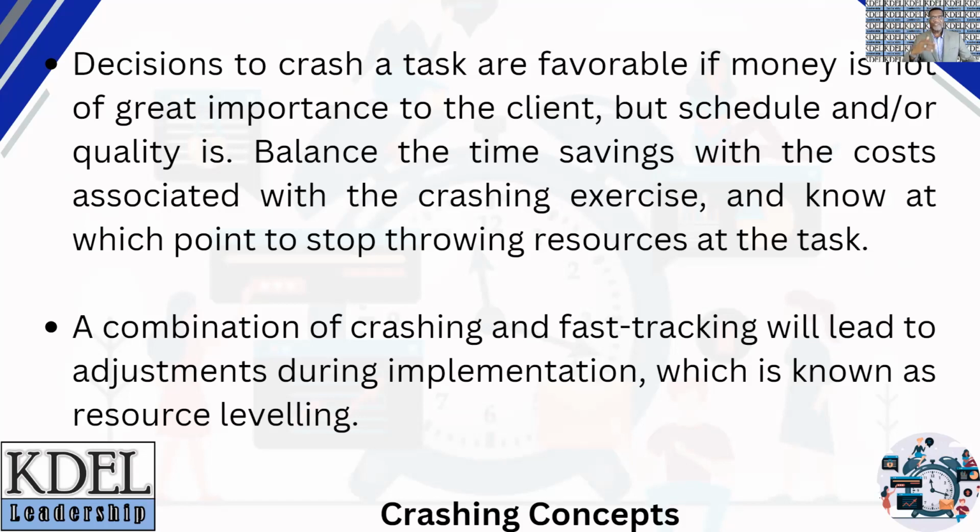So when you have 3 tasks, you want to select that task first and get it done. So in the case of our example, you want to select task C first because it has a minimum slack. After that, you select task B, which has a slack of 2, which is lower than task D's slack, which is 3. Task D, therefore, will be the last of the 3 tasks to be resource leveled. Now, if for any reason the slacks are the same, we should break the tie by selecting the task with a shorter duration.